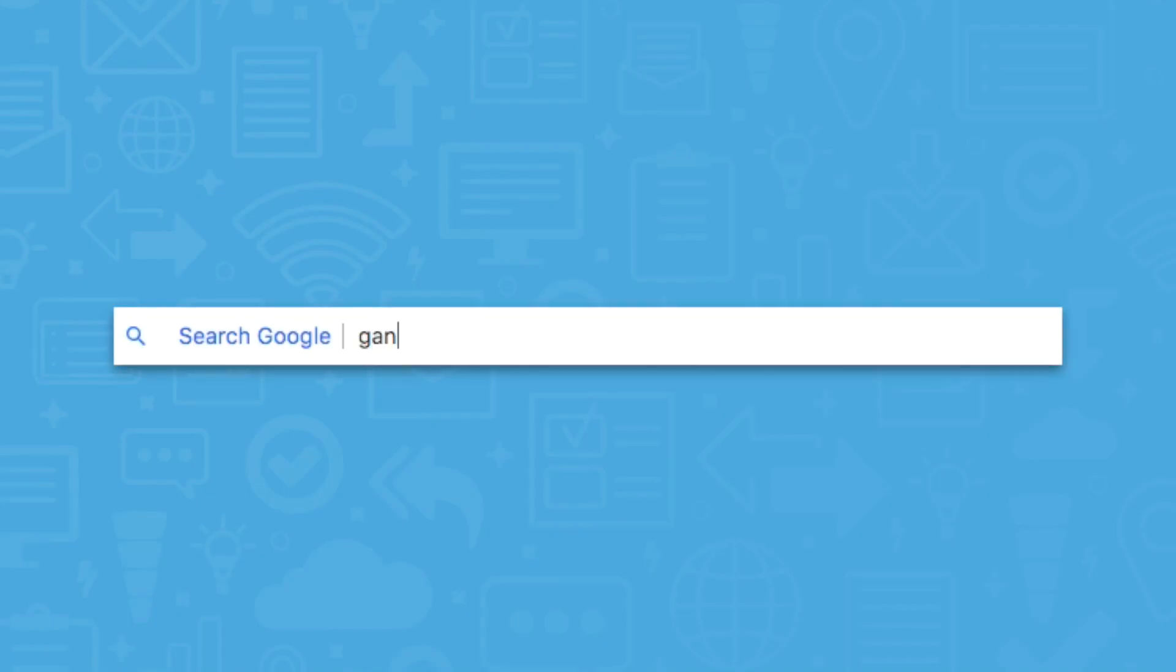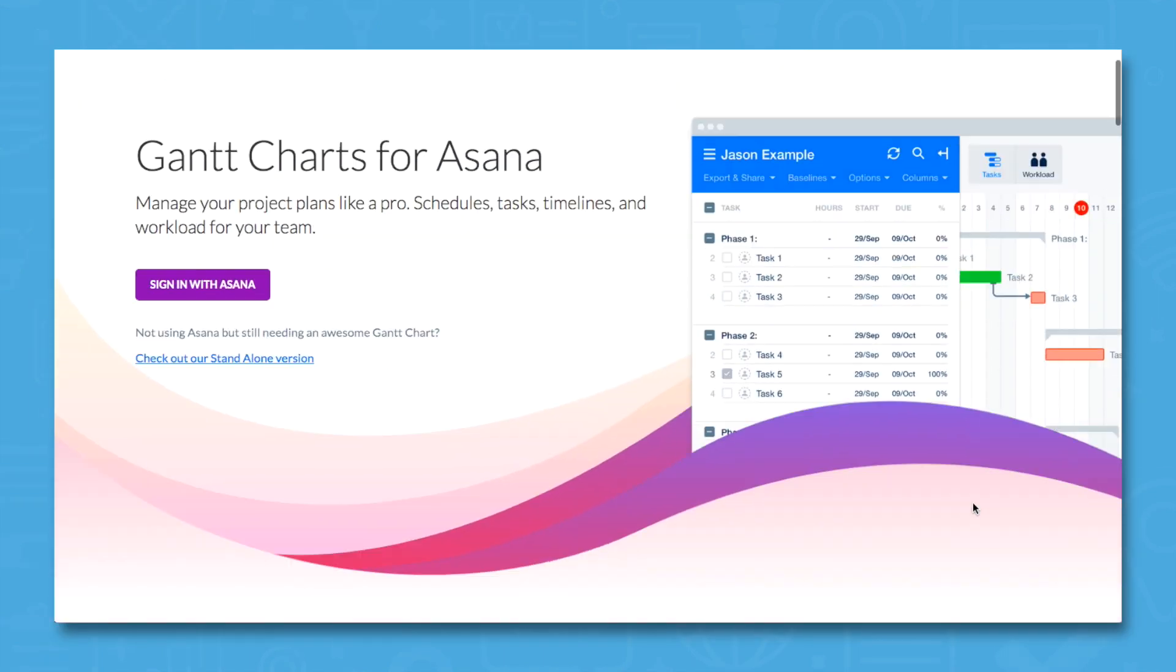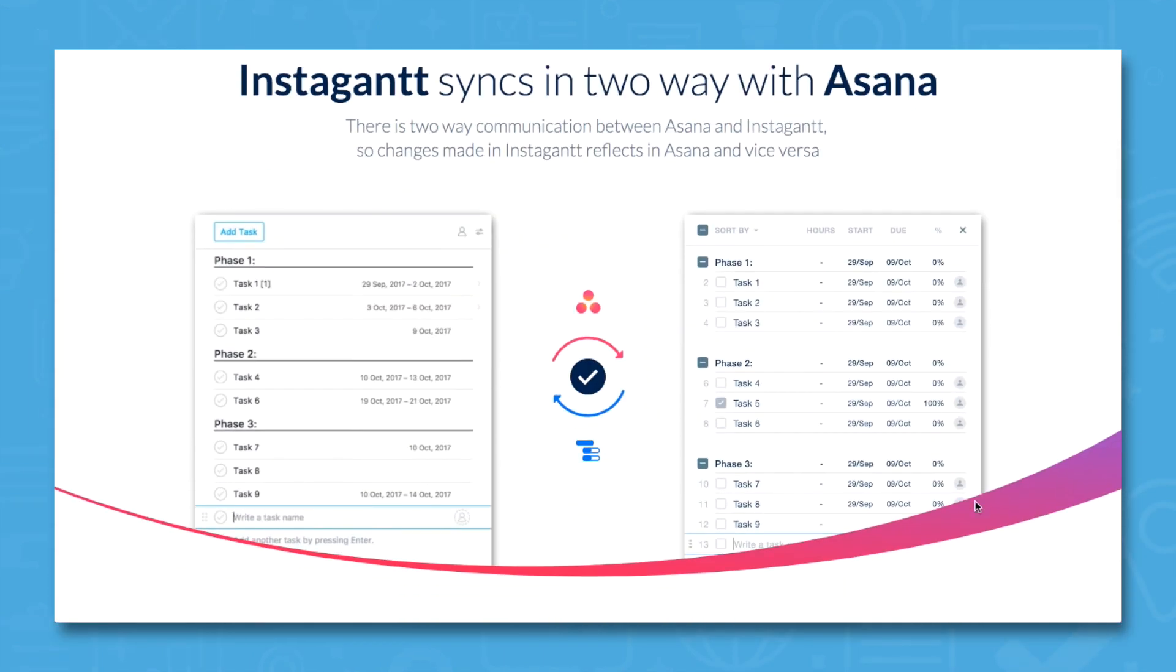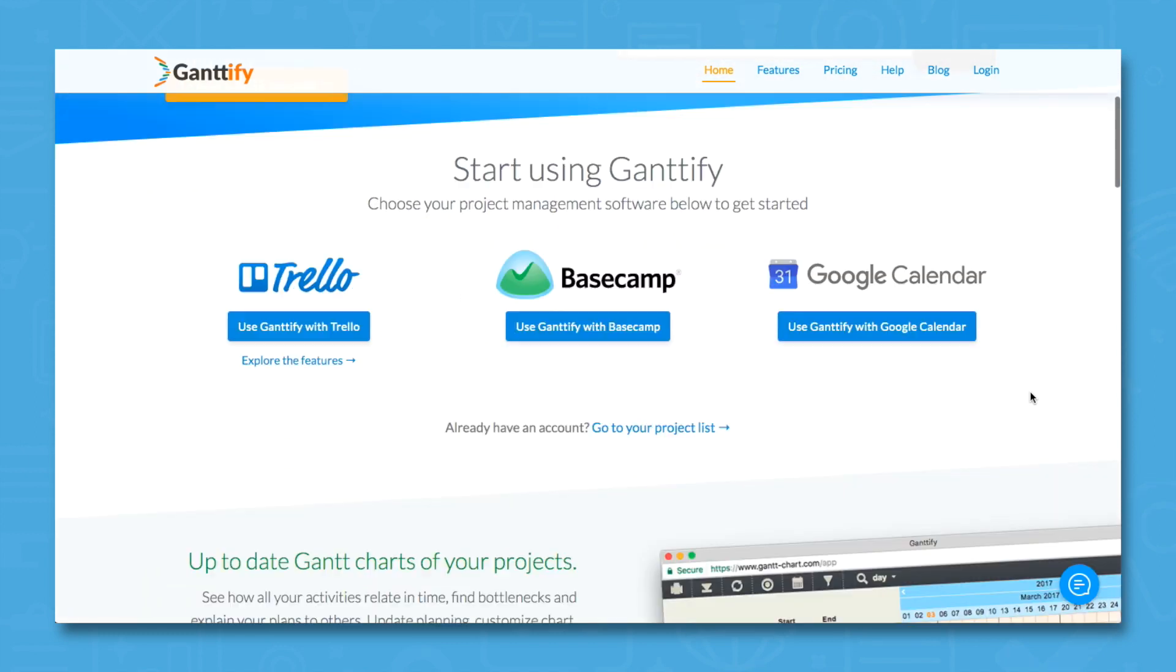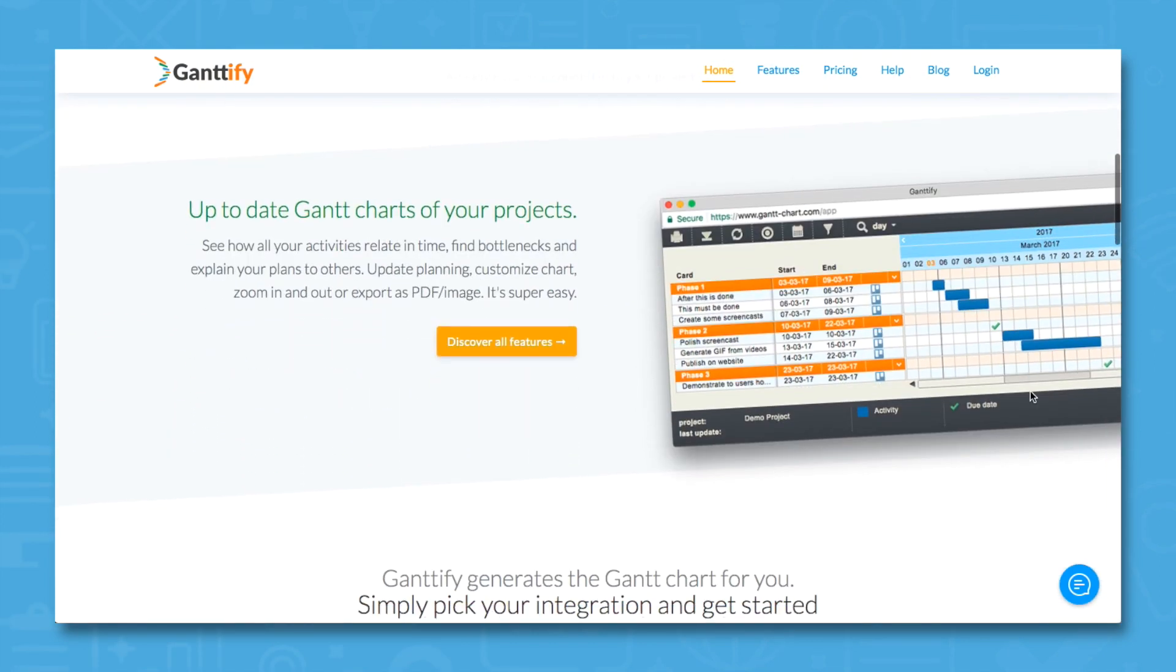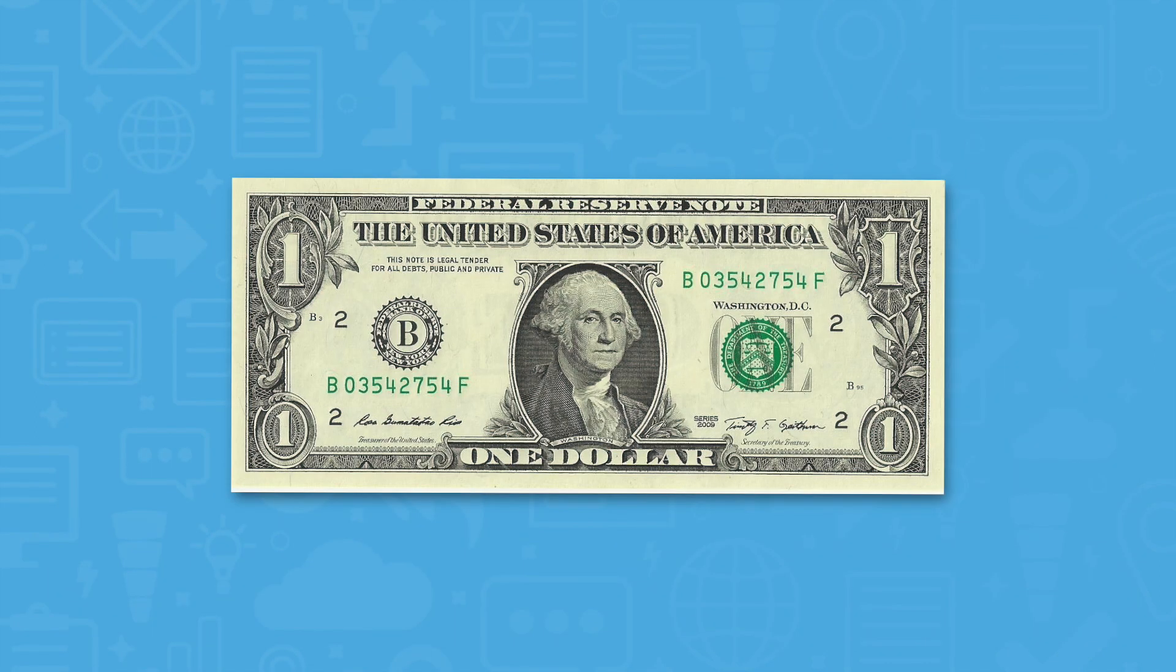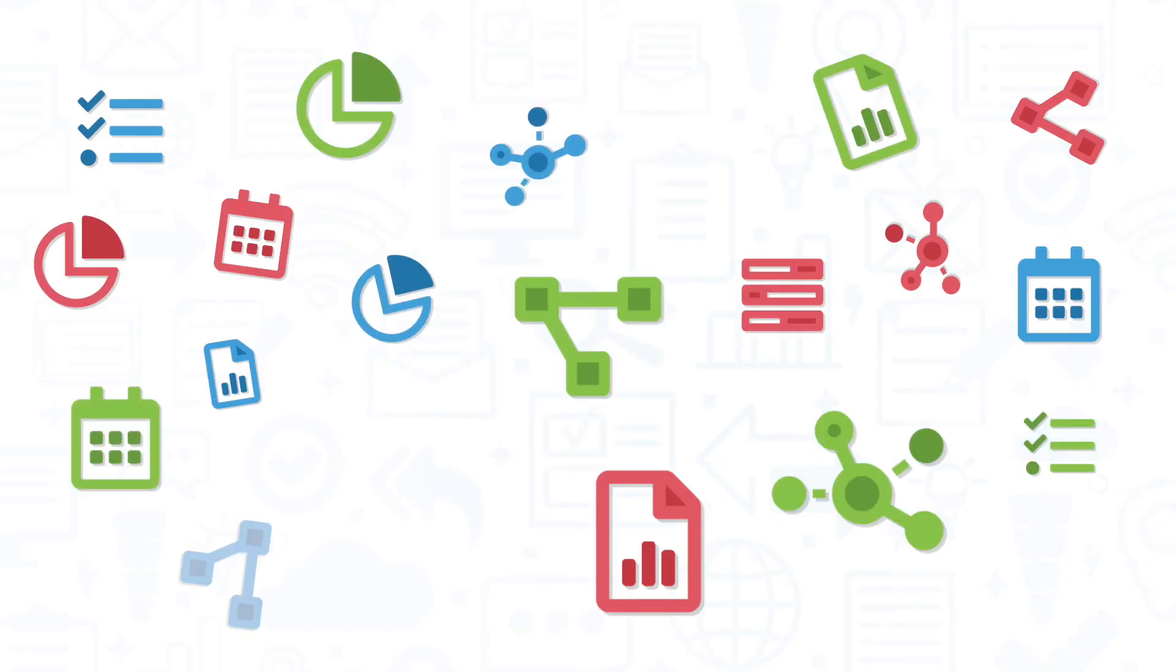It's worth noting that neither Asana or Basecamp currently offers a feature for building Gantt charts, but both solutions integrate with third-party apps that can do this for you. If you're using Asana, there's Instagant, and if you're using Basecamp, there's Gantify. Instagant and Gantify are both third-party apps that cost extra, so take this into consideration when deciding which solution is right for your team.